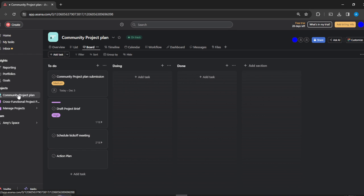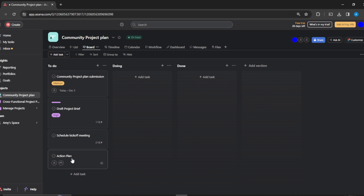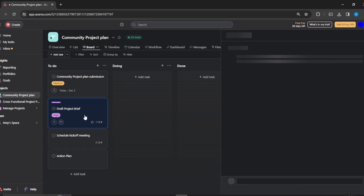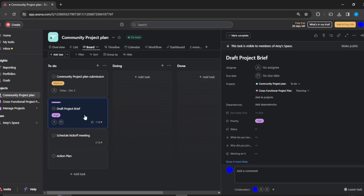Right here I have my tasks: Draft Project Brief, Schedule Kickoff Meeting, Action Plan. Linking tasks into each other means I am making them dependent on one another. Here's how we're going to add the dependencies. Click on the task that you want to work on—this is Draft Project Brief—and I want to link it to Schedule Kickoff Meeting.